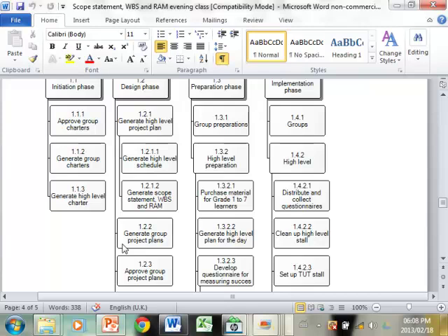Then on the 30th of June, you and Rolls-Royce together will test it. So there's always a level of integration, which has to be on your work breakdown structure. And you have to inform the supplier or the subcontractor that by the 30th of June your prototype needs to be delivered, and we will be testing it according to this specification. That's how you keep tabs on it.